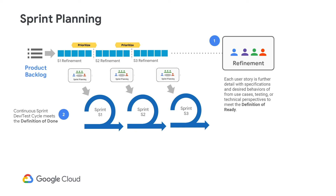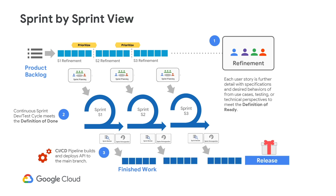The team also needs to set the definition of done for a user story at the start of the project. This is the line the team draws in terms of the standard of finish and quality that should be adhered to, so there's no misunderstanding at the end of the sprint when a user story is marked done. In the last step, finished work can be queued for product release and bundled per sprint. The automated CICD pipeline helps the last leg of the process quickly flow from tested and approved code into the main branch.